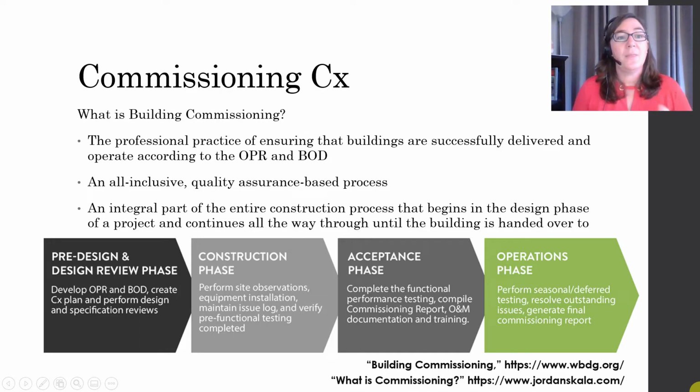All right. This is an all-inclusive quality assurance based process. Right? But it's not done at just one point in the design process. No, it is an integral part of the entire design and construction process. It begins in the early phases of a project and continues all the way until the building is handed over to, that should read, the owner. So you start in the pre-design process, all right, moving through the construction phase, acceptance, and operations.